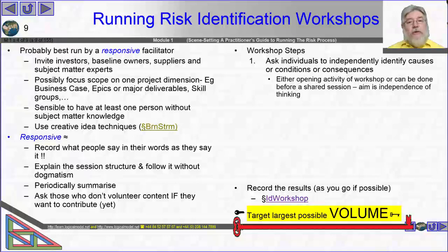What we're seeking to do here is get people to think independently. So the aim at the first step is to think independently, but then we're going to get people to share, and in sharing what we want them to do is read them out aloud, and we're going to record them to our central visible accessible pool. And what we're doing now is creating the possibility for people to generate synergy.